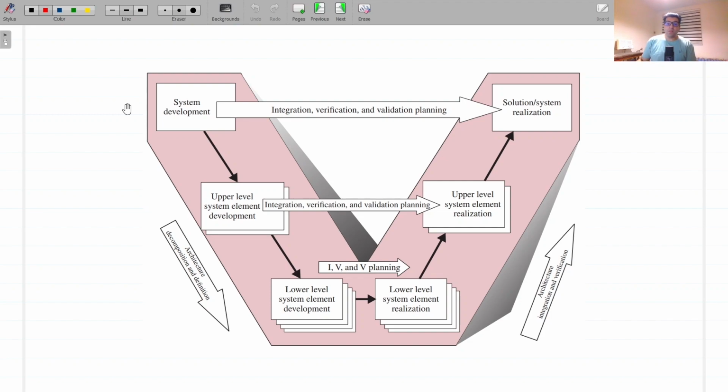However, unprecedented projects or projects with a high rate of unforeseeable change, poor predictability, and a lack of stability often degrade, and a project may incur significant costs trying to keep documentation and plans up to date.